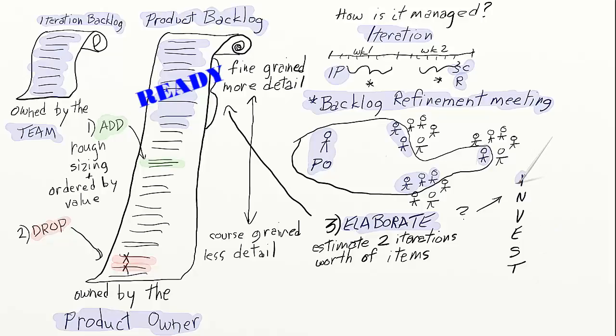The I in INVEST means independent. A story should be able to be implemented without depending on another story. Sometimes it takes adjustments of stories to achieve this. The N in INVEST means negotiable. A story shouldn't be so highly defined that a team has no room for innovation. The V means valuable. A story should most often produce some end-user value, although sometimes technical stories which produce foundational value for other stories might not fit this criteria, and that's okay, but try to see some end customer value whenever possible.